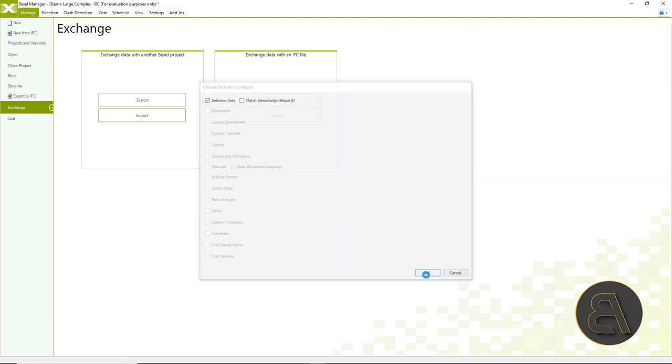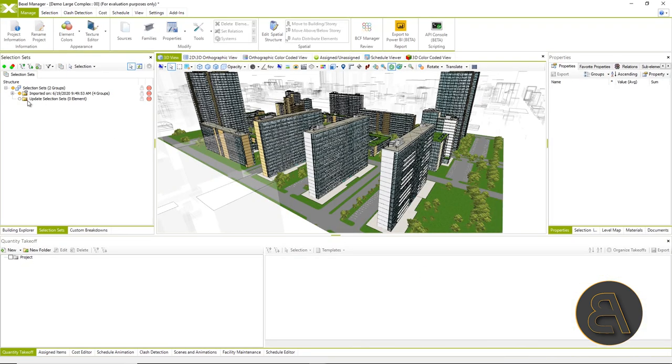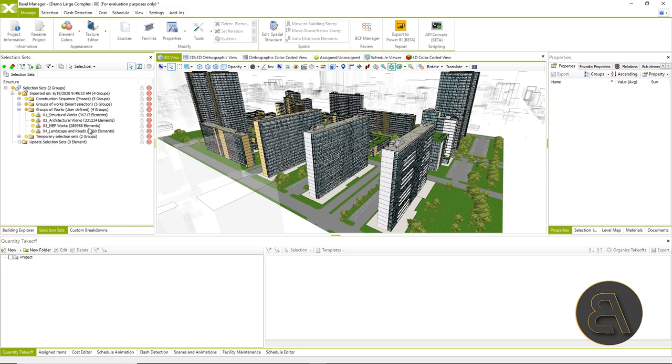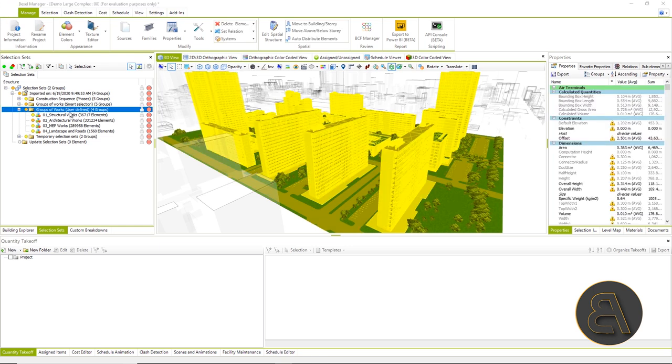In order not to get acquainted in detail with the content of the model, it would be best as written in instructions to import selection sets for the first step, which have a basic division into architectural, structural, MEP works and landscape.